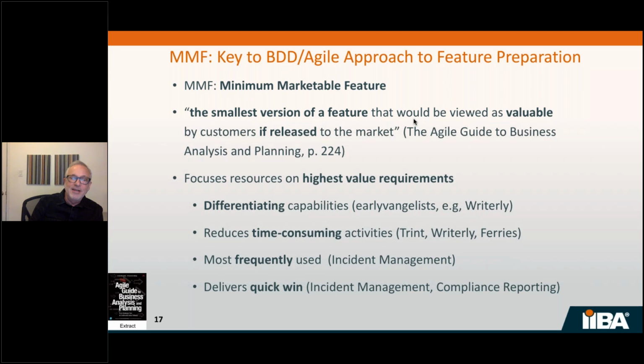So an MMF is not the same as an MVP, for those of you who might be asking about that. The purpose of an MVP, minimum viable product, despite the name, is really for testing an idea out in the market. It's really an experiment. But the MMF is really a full enough version of the feature that we actually could release it to the market.